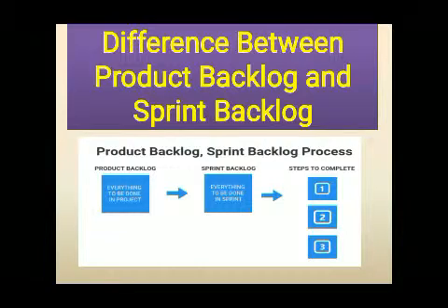The product backlog is a priority list of user requirements and use cases to be done in order to create and maintain a project. The product owner owns the product backlog. He is the one who prioritizes based on customers' feedback or business value. The product backlog acts as an input to the sprint backlog when it comes to functionality.